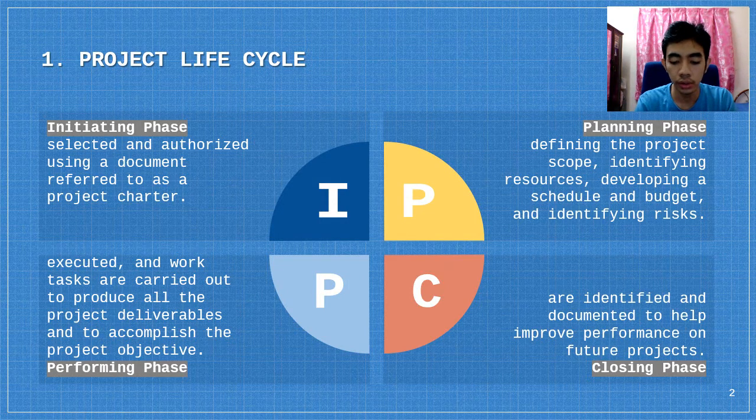Needs are often defined as part of an organization's strategic planning process. Organizations must have a project selection process to determine what projects to pursue. The project charter includes rationale or justification for the project, project objective and expected benefits, general requirements and conditions such as amount of fund authorized, required completion dates, major deliverables, required review and approvals, and key assumptions.